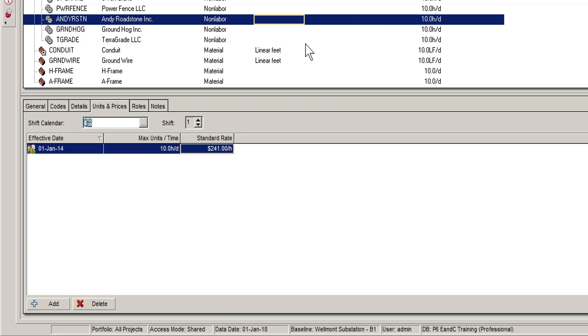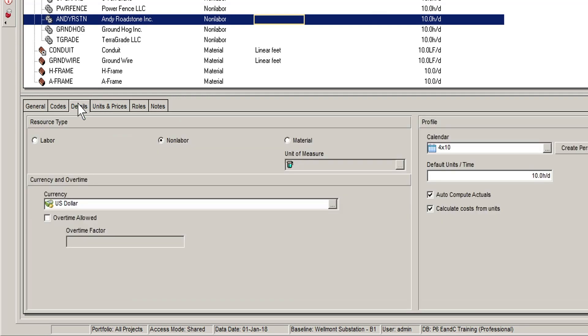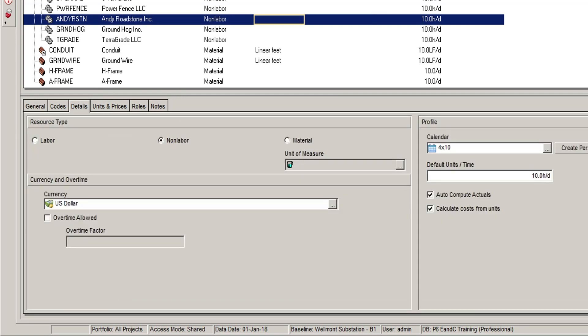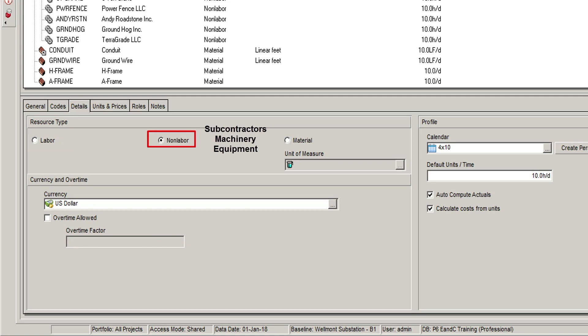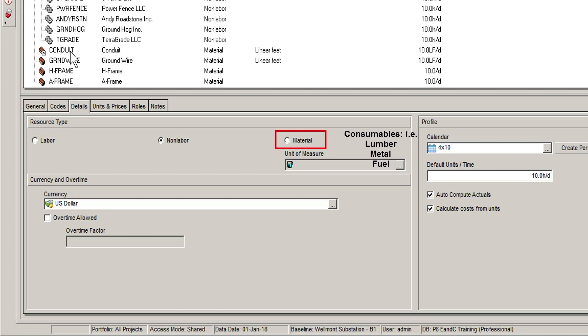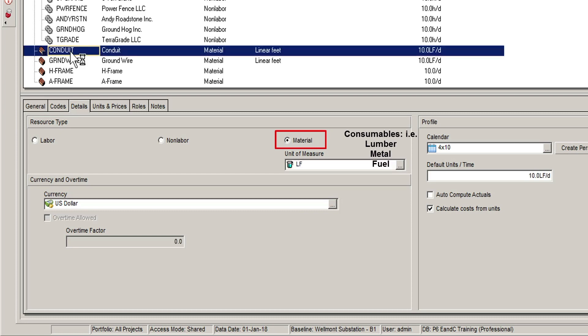We can see these options in the details tab at the bottom of the layout screen. Labour resources are used to describe trades, skills, or even named individuals. Non-labour is generally used for subcontractors, machinery, and equipment. Material resources are used for depletable or consumable items such as lumber, metal, fuel, and so on.